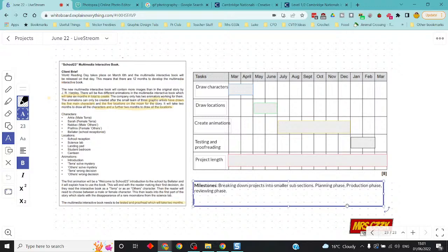Then another thing that's not on here is contingency. Now, contingency is if something goes wrong. I did notice a couple of mine did put contingency on some of these, which I thought was really good to see. So these are your what if scenarios. Now, we're not talking Marvel what if here. We're talking what if the computer doesn't work, or what if your animator goes sick, what if you have to shut down the studio. So it's extra time added onto a task in case of an unforeseen event.